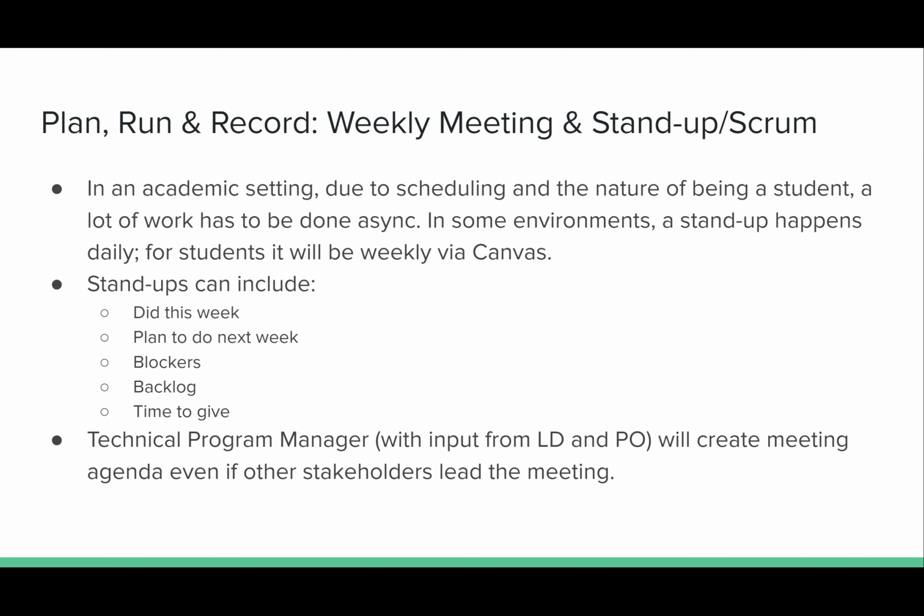In the stand-ups, which you're all used to by now, there are some things that can be included that are super important. It's mainly what you did this week, what you plan to do next week, any blockers that you might have, any backlog issues that you have time to work on outside of the issues you're already working on, and how much time you have to give.